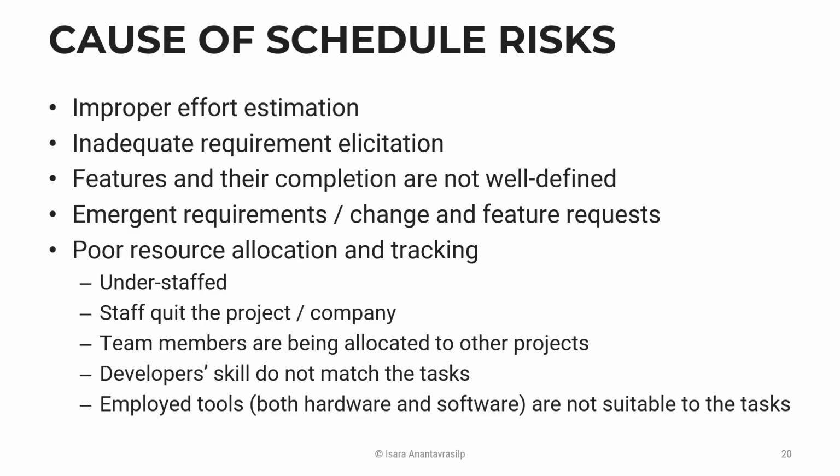But sometimes the developers themselves are forced to work in some project or on some platform that they are not familiar with, for whatever reasons. This could cause some delay, because if they're not familiar with the tools or the domain, the estimation is going to be much more difficult for the team, right?